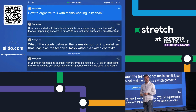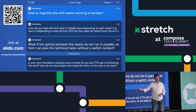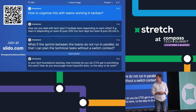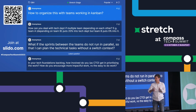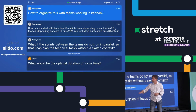Now, this does bring up a key implementation detail, which is that you want the backlogs for your product work and your Tech Foundation work to be separate, right? We already said that Tech Foundation work is more aligned with guilds, so have a backlog or a project in Jira, if you use that, that is, say, back-end guild or front-end guild. And so it's separate. You're working on your cross-functional Kanban team for 4 weeks against that Kanban board, right? And then you stop. People work with their guilds for a Tech Foundation week. Then you go back.